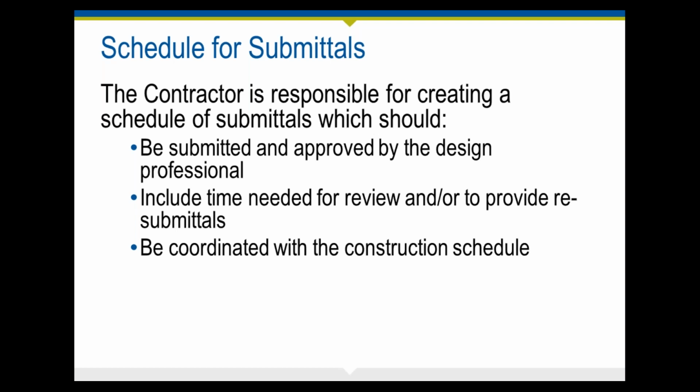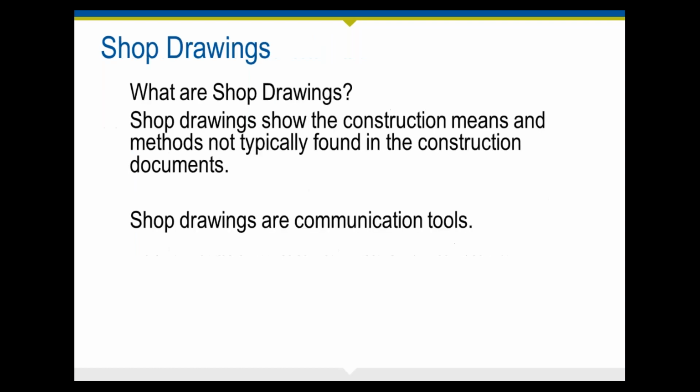So it needs to be really coordinated with the construction schedule, and after you've approved it, or when you're reviewing it, the contractor should budget into their schedule time needed for review, and oftentimes time needed to provide resubmittal. So that is indeed a way to make sure that the contractor is really thinking about planning the project properly.